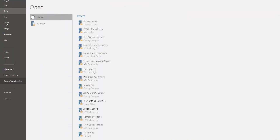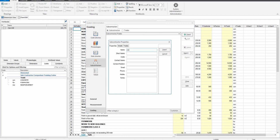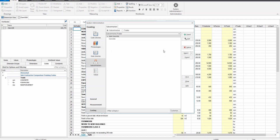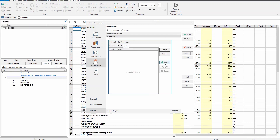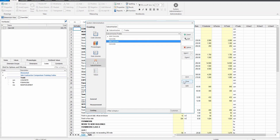We'll start by inserting a subcontractor's profile. This is done by going into system administration and selecting costing. Under the subcontractors tab we can insert two subcontractors and their relevant details. We can also nominate the trades to match the trade breakup workbook to the relevant subcontractors. A more advanced way is to import all the user subcontractors with a CSV file. We can also add subcontractors directly in the workbook.